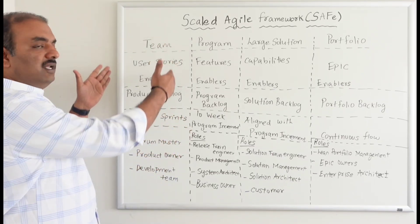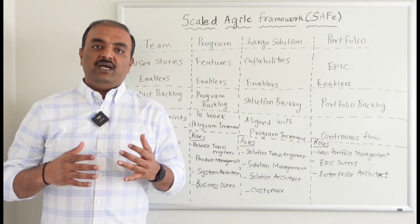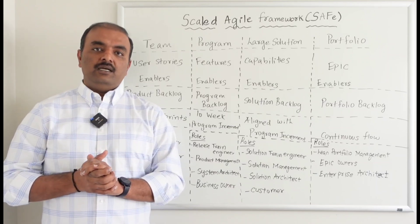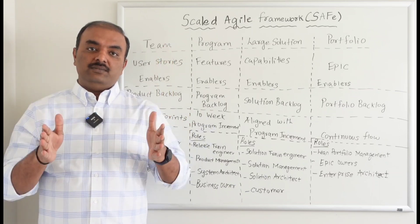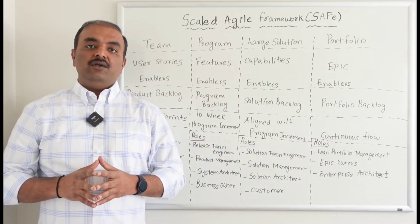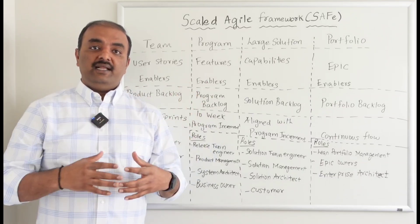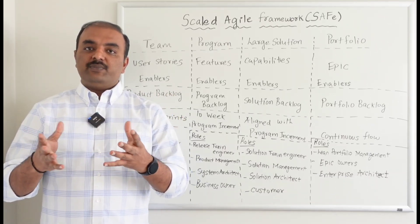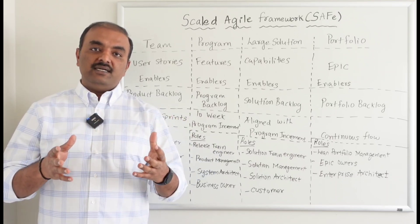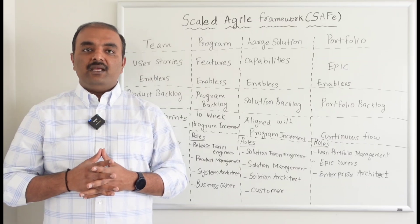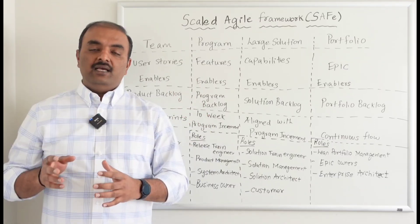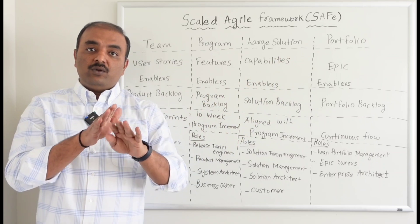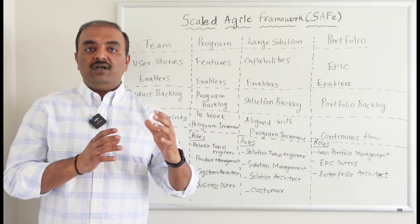Now this team framework is very successful — we have user stories, we have the required roles. Then why do we need Scaled Agile? A couple of problems: in a company it's not that there's going to be only one team — there could be multiple teams. If multiple teams are working in different cadences — say team one is on a two-week sprint and team two is on a three-week sprint — there will not be any uniformity, resulting in gaps. It also becomes very difficult to find dependencies when a feature in one team depends on another team working on a different cadence.